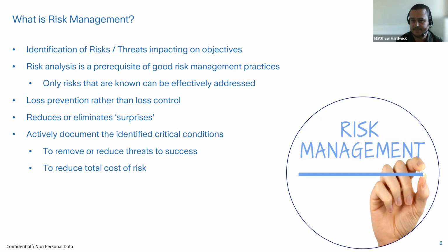Think of that 20% that sits above the iceberg as being, okay, if we've got a risk of losing a building due to an extreme weather event, then there may be some impact on the cost of having to shut the building and perhaps making sure that people are safe and working in their new environments. But then there's perhaps a little bit of making good work that needs to happen to that particular building, and some of those costs are relatively easy for us to understand and relatively easy for us to quantify. The 80% iceberg that sits below the surface, these are the more difficult elements to quantify.